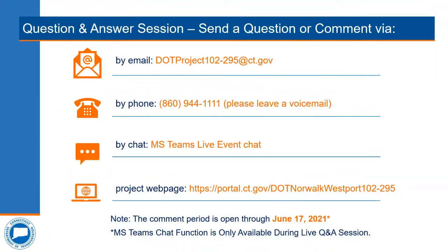Hi, Dom. This is Brett Stark again. Yes, again, we do recognize, as noted in the presentation, that there will be multiple construction projects occurring at the same time here. When it comes time to undertake the lateral slide weekends, that work will be publicized and coordinated extensively in advance to ensure that there are no simultaneous full closures or major activities going on that would create extensive gridlock.